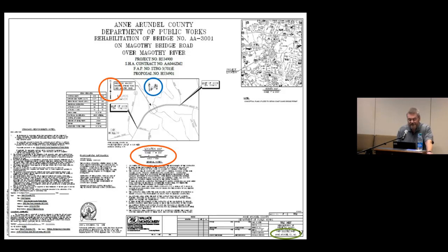However, the location map is much smaller than we'd like, barely showing anything in the middle of the plan sheet. The ebb and flood, also in blue, is depicted, but again, barely discernible. You can't see the adjacent property owners of the bridge, which is a requirement, nor are there any wildlife or waterfowl refuges or historical or archaeological sites identified.